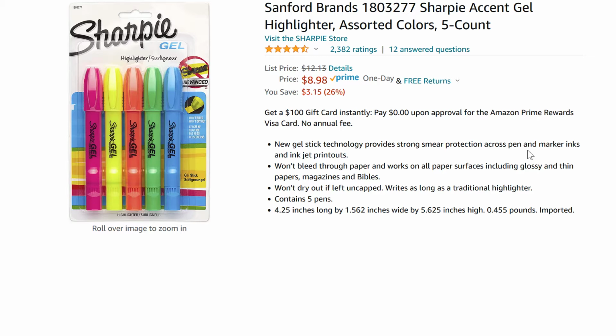I also highlight any material requirements that are noteworthy, like flexible conduit can only be used for equipment connections under 6 feet in length, for example. I use green highlighter for material notes to differentiate them from installation guidelines. You just never know what standards the engineer is going to require on different projects, so make sure you highlight unusual items so you can remember them and quickly find them as you work your way through the drawings.